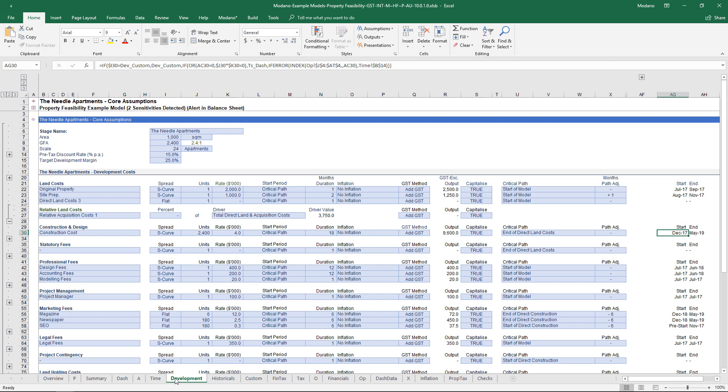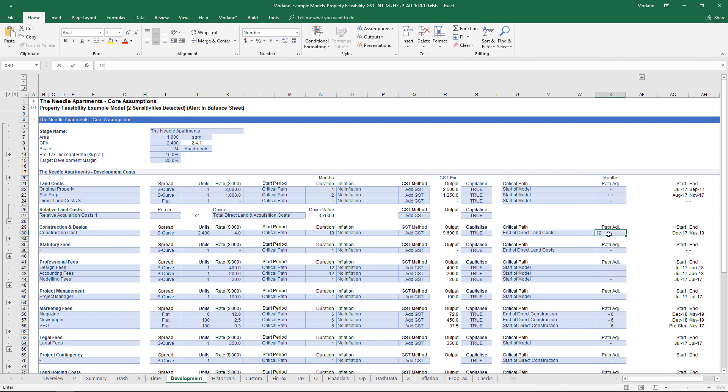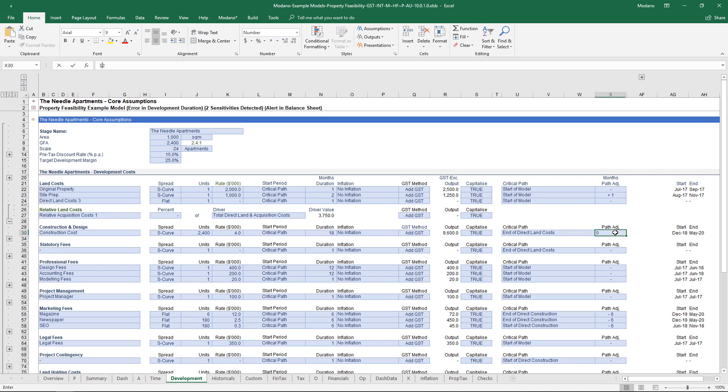The other thing to note is you can have differentials around that timing. For example, our marketing costs are starting six months before the end of construction. If we run a sensitivity case that says construction is now going to be another 12 months, those marketing costs will be pushed out as well. All the sales hang off end of construction and so on. We're really giving people the power to use a model that breathes by time to understand the impact of time on delays.